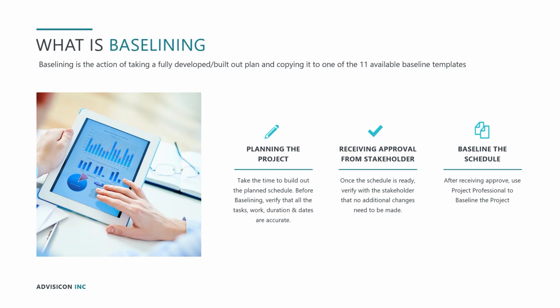So when you look at your baseline in Project Professional, you'll see a baseline column called baseline start or baseline finish. And so when you take that action of baselining in Project Professional, it copies your start and finish date into those columns.